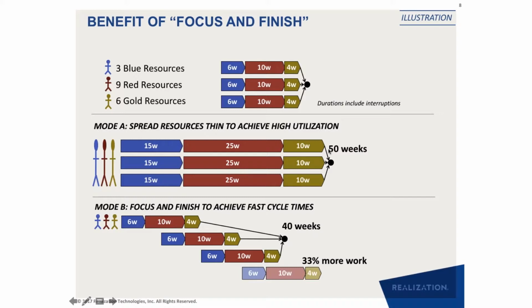So then this 50 weeks would have become 25 plus 12 and a half, 37 and a half weeks. But now in this case, we are saying you can actually finish it in 20 weeks, the cycle time. And you can start the second project based on the red resource somewhere here, which is somewhere 10 weeks later. And you can finish it approximately 10 weeks later. So in 30 weeks, you will finish 2 projects. In 40 weeks, you will finish 3 projects. And the other way of saying it is, given another 10 weeks, I can do 1 more project, right?